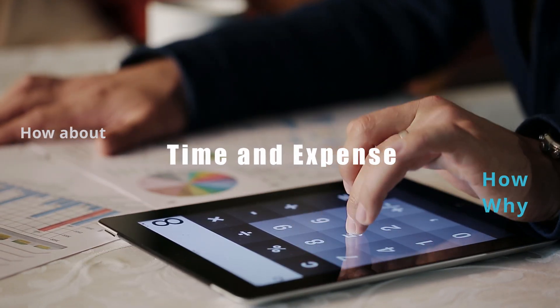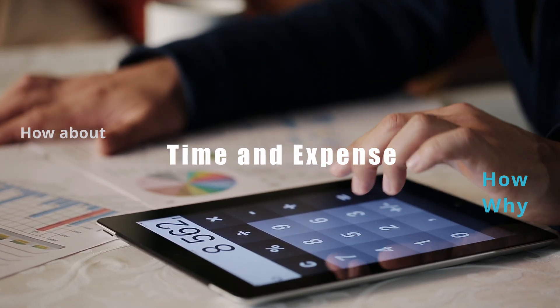Based on how many hours you estimate are required for that project, you can work out the rough cost estimate that you need to charge to make sure that project is profitable. Now, this is going to vary between company to company, even countries where you've been delivered, or what type of job you need to design. So you need to go to your company and see what the burden rates are to make sure you're pricing your projects effectively.